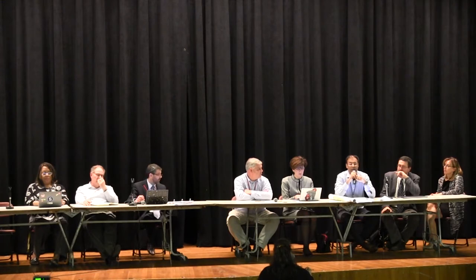Okay, and then with that, I wasn't clear about whether or not we would be addressing the LEED certification. There was some talk about it at another meeting, but it didn't seem definitive. So the LEED certification, we will make a final decision as we move further along in the project, but generally speaking, the current LEED requirements under version 4 are very challenging at best for a suburban type school project. It's very heavily weighted on urban projects in terms of getting credits, so it gets very challenging to meet gold or silver levels, which are the only levels that actually provide you with any type of platinum funding. Very difficult to do that.